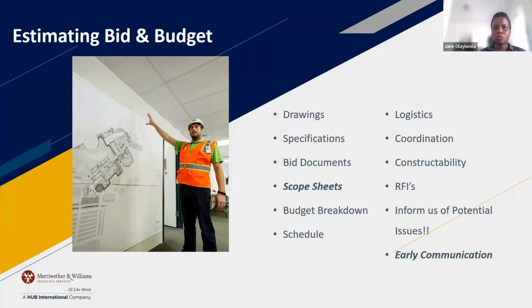Yeah, I agree with that, Robert. So when you submit a bid, you want to be clear for how long that bid is valid. Is it valid for 30 days? Is it valid for 60 days? Is it valid for 90 days? In special cases, especially in the kind of economic environment that we are in right now, that's a really great question.